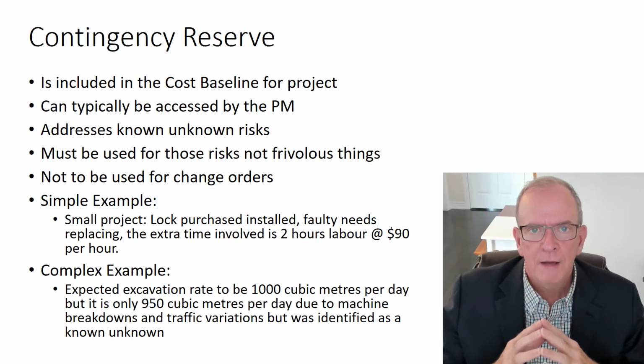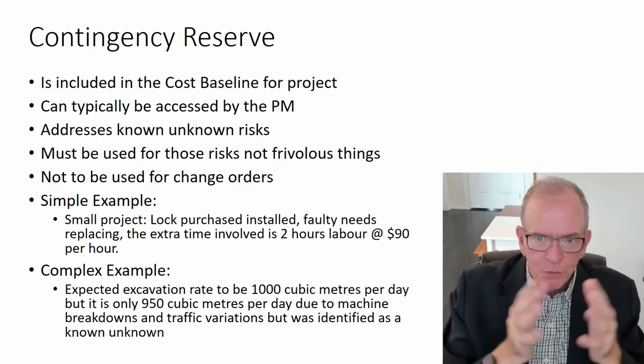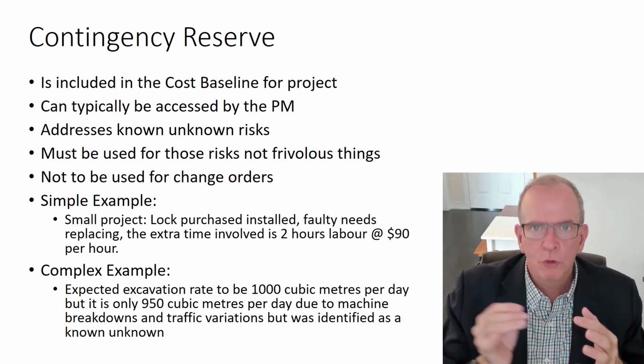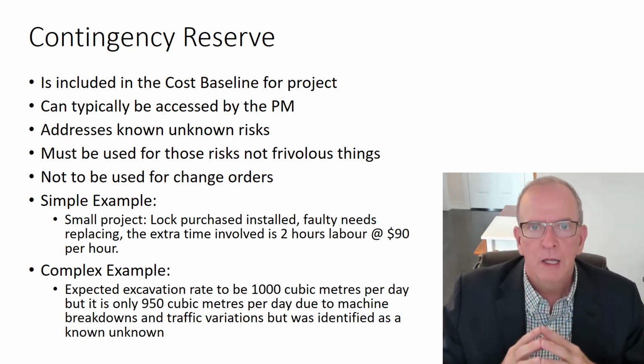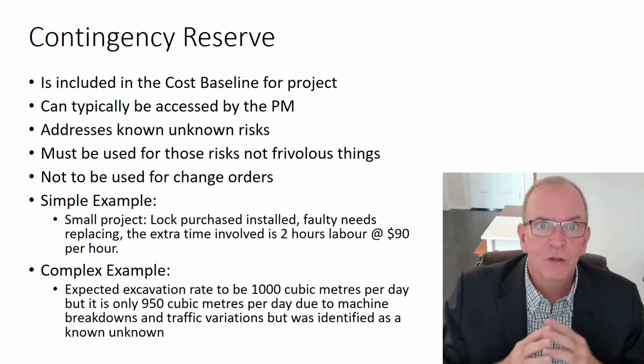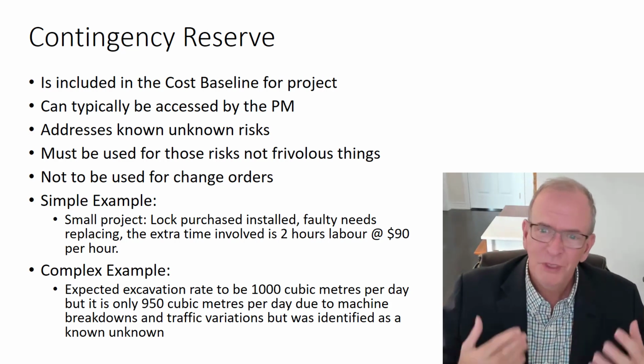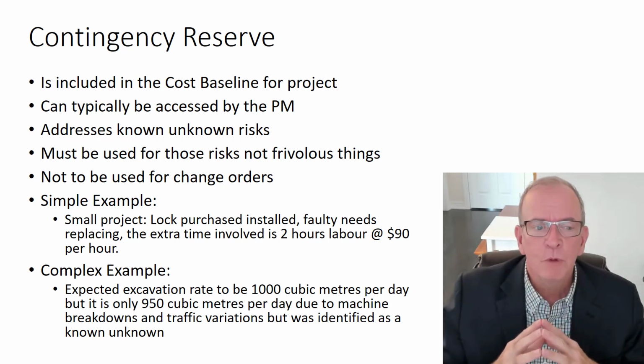And so you want to have something in there for those types of things that occur, because very often if you didn't on these very small things, something would always be coming up that you didn't allocate for. You're doing the planning fallacy, thinking things are going to run perfectly well when there are certain risks that have a certain probability that they will occur.